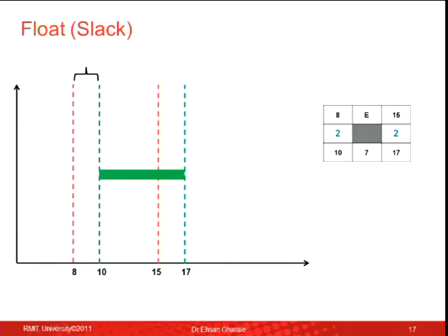So what this concept is talking about is the flexibility that you have in implementation of your activities, how much you can actually delay it without an impact. That's the meaning of it. How do you calculate it? It's the difference between 10 and 8, between 17 and 15. Where do you write it? You write it there. So these are 2 remaining boxes on your activity box. The figure written in between gives you the amount of slack and flexibility that you have. Any question? No? Okay.